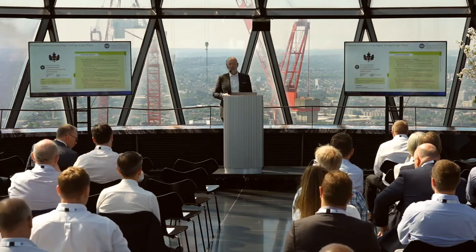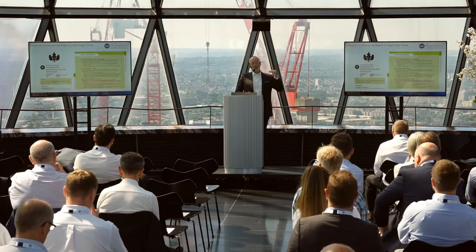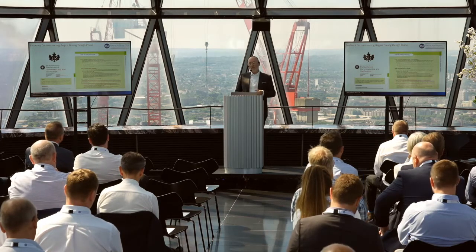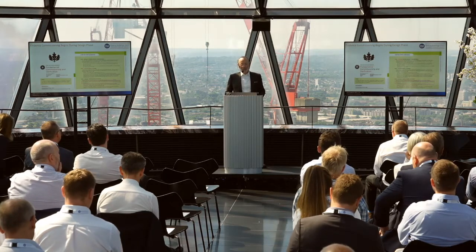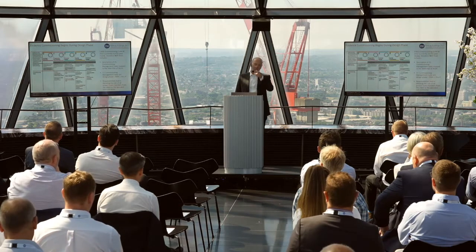LEED, very clear. If you are doing a LEED job, there is a presupposition. LEED assumes that the commissioning authority has been hired early by the owner to advise them on the design brief and be there all the way through. I'd say 8 out of 10 LEED jobs I do, I get hired late in construction. The new Code M. So, Ted's laughing.